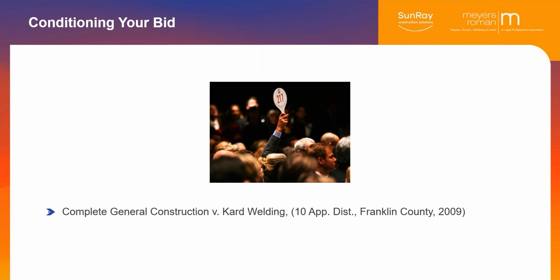which is when the first case was around on this concept of reliance. It was a California case, Starr v. Drennan. And I like to say that a lot of laws are made in California that then infect the rest of the country. Well, by the middle of the 1960s, it had infected Ohio. And so now we went from California to Cox Plumbing versus Wargo, and Cox tried to back out. They wanted more money, and the court said, nuh-uh, technical legal term, nuh-uh, you made a bid, he relied on it, so you're stuck, you have to perform.